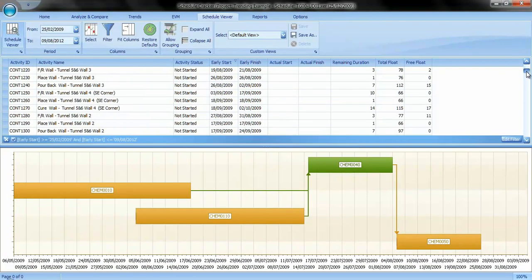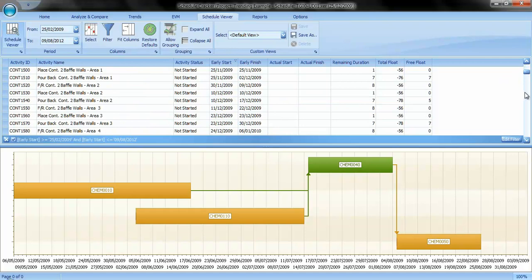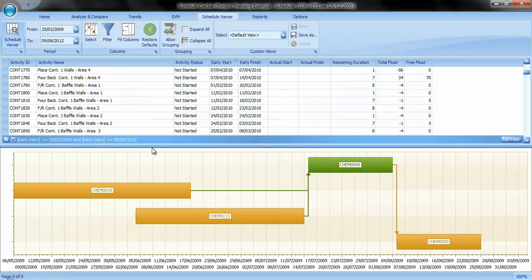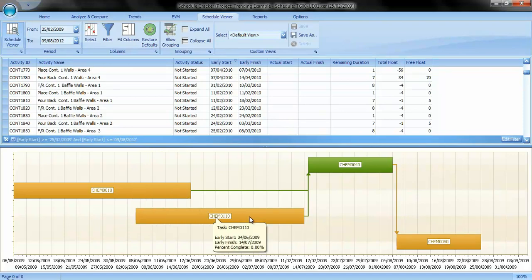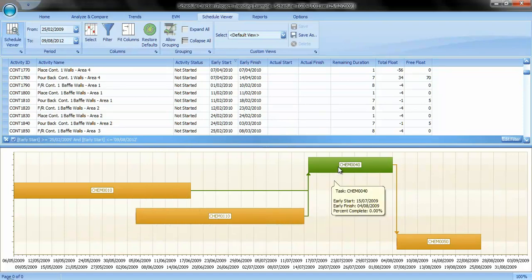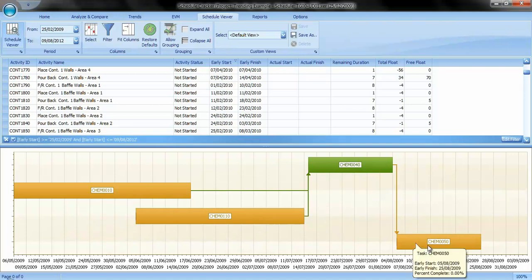A list of all of the activities will be presented on the top. Any highlighted activity will come in focus in the bottom pane as a green activity bar. Predecessor and successor activities will be displayed as orange bars.